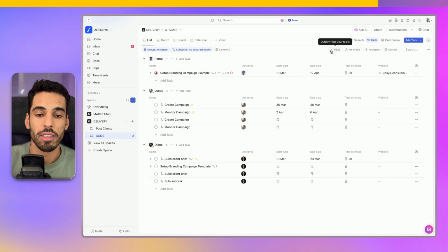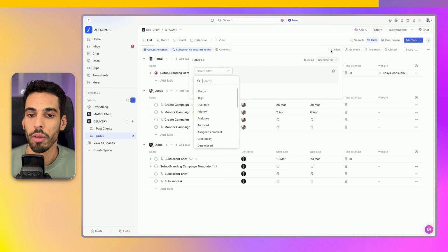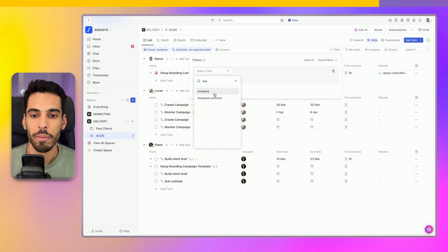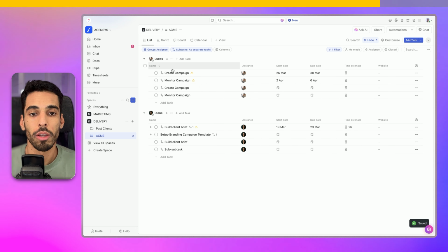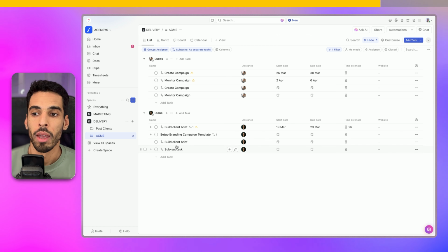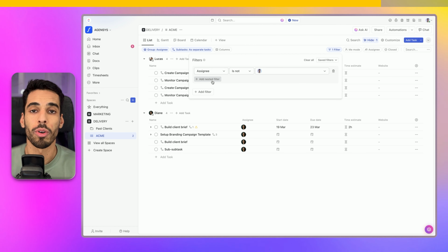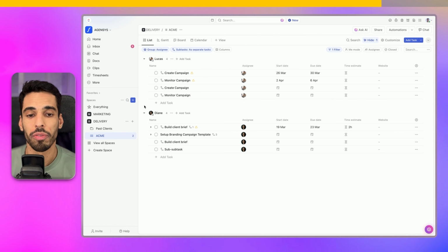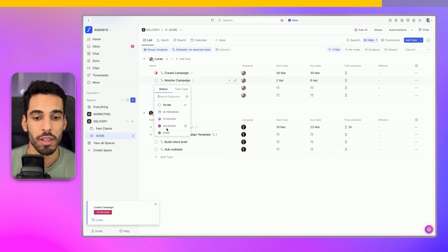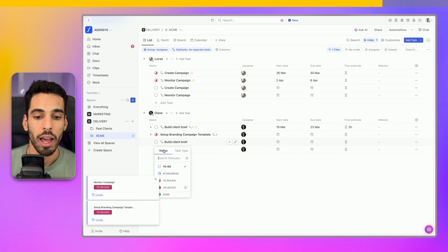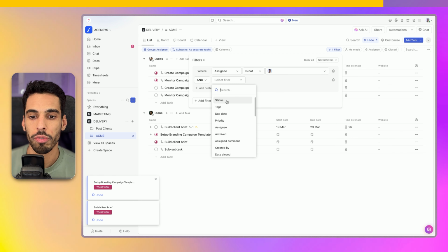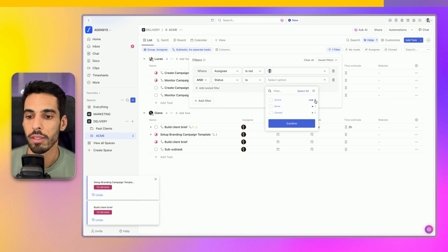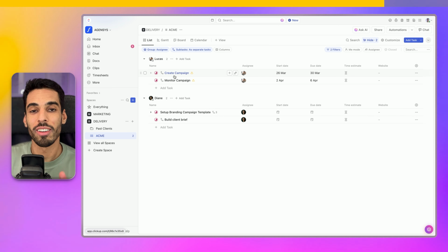The next thing you can do is use filters. Say you don't want to see the tasks of the user called Ramzi. You're going to click filter, then click assignee in the filter settings, choose "is not", and then pick Ramzi. That way you'll only see tasks of Lucas and Diane. And you can combine those filters together to have much more complex conditions, like combining a filter by assignee and, maybe if we change some statuses, another filter that says I only want to see tasks for these people in the status review. So you can add another filter and say "and status is to review", confirm. So we're only going to see the sample that we need of those tasks in our view.